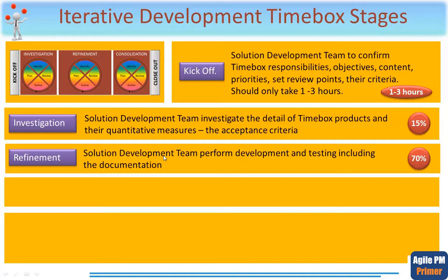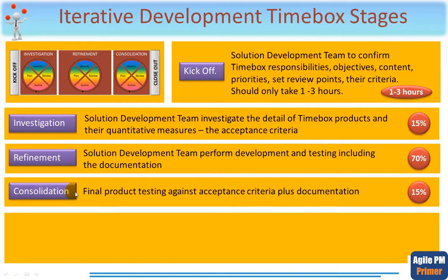If such significant changes are being requested at this time, then it may be a clue that business representatives have not been fully involved thus far, and could be captured as an important lesson to be used on future time boxes and indeed future projects. So this suggested review at the end of refinement is used to drive the next iterative step, consolidation.